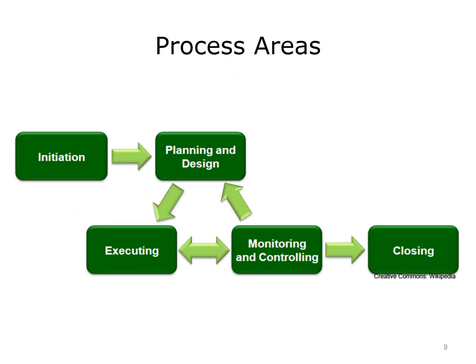The 5 process stages of project management include the following: initiation, planning, implementation, monitoring and controlling, and closing. The initiation stage covers all the processes that define the project's scope, objectives, and environment. Once the manager develops a comprehensive grasp of these details, he or she can begin the planning stage. This stage focuses on developing a schedule and budget, identifying necessary staff, resources, and supplies, and preparing for potential risks. All of this work is captured in the project plan.